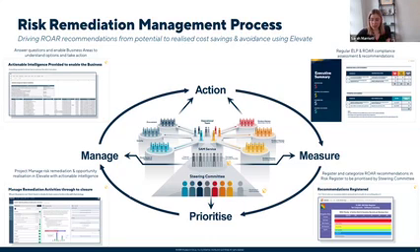And I think the other key piece to this puzzle that Harry alluded to earlier is the SAM procedure document. A few years ago, we rewrote the SAM policy and procedure documentation to reflect the ABB way. And this includes a very detailed RACI that outlines who is responsible, accountable, consulted, and informed for each step throughout this process, from data collection to confirming stakeholders through to risk remediation and cost savings opportunities.